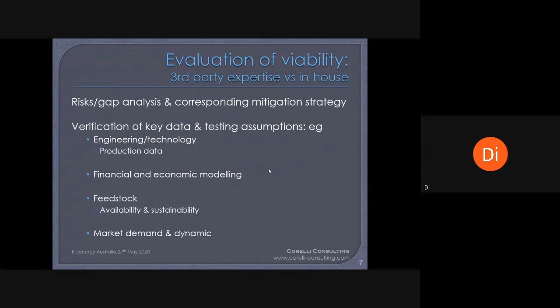Here we look at the prospective value of outside specialists to the developer in this process. The commercial feasibility due diligence that investors conduct often involves experts or specialists, in-house or third party, who, for example, undertake technical feasibility testing. Can the project be implemented as planned, using proven technologies and without unreasonable technical risks? Legal due diligence: are there legal barriers to implementation of the project, as well as environmental and social impact assessments?